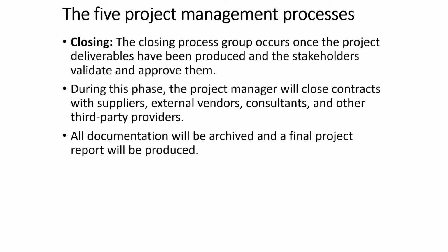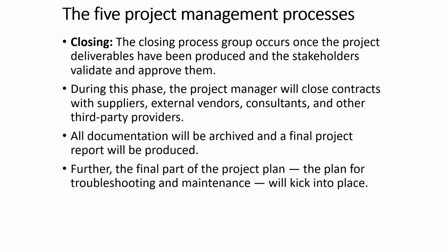Along with conducting lessons learned sessions, getting approval for deliverables, and resolving outstanding issues, a key closing activity involves the collection, organization, and storage or archiving of the project information.